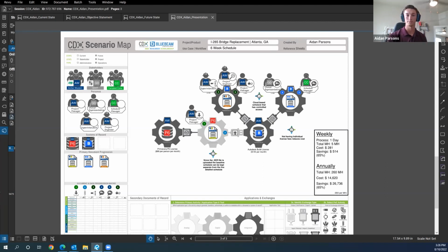Any other questions? So there's not a sync back to the master schedule? There is not currently. For some projects that might be acceptable. We're not allowed to do that because we have to keep those separate. That makes sense. But obviously we know whatever impacts in the 6-week schedule, however that affects CPM and other things like that. I think the future state would be to sync back into the master schedule to see what impacts that 6-week look-ahead is having on the overall schedule. Yes, I would like to see that integration between P6 and Autodesk Build. That would be nice. DJ, tell me a practical way to do that.